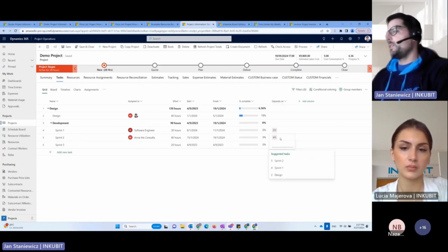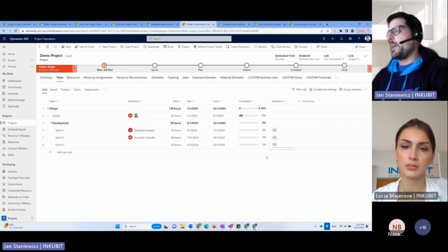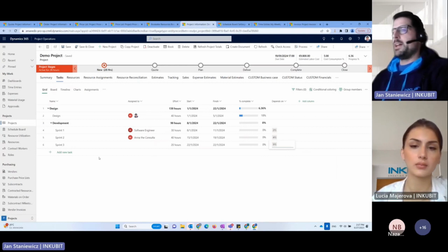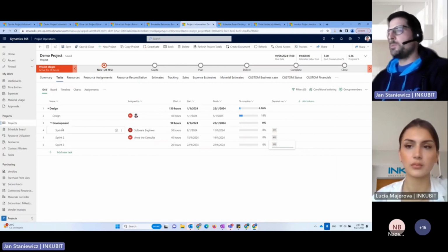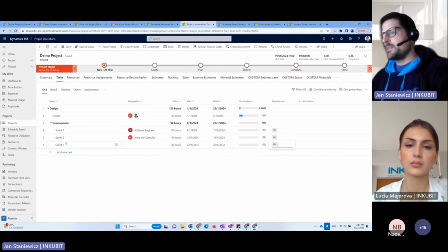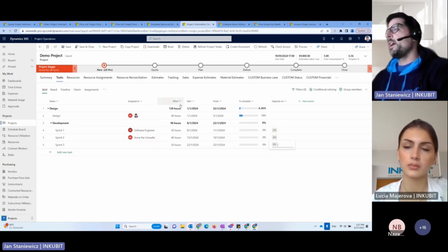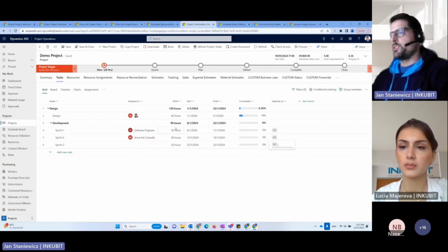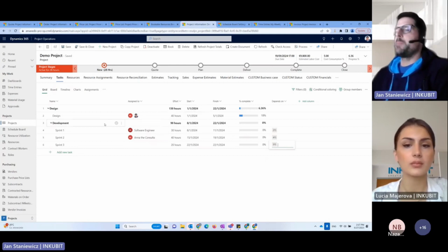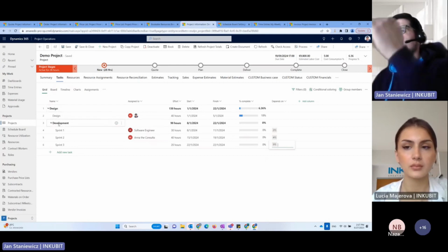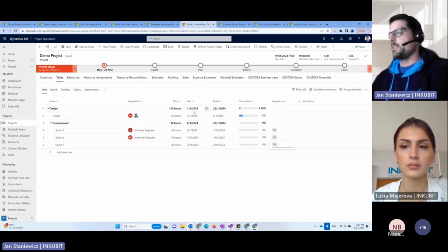This is also a pretty nice feature that we are able to link, or create dependencies between items. What this brings us especially is, for example, when postponing the whole project, or if there is a delay of 2 weeks, then the whole project structure will get 2 weeks later. So we don't have to do it with every single item.